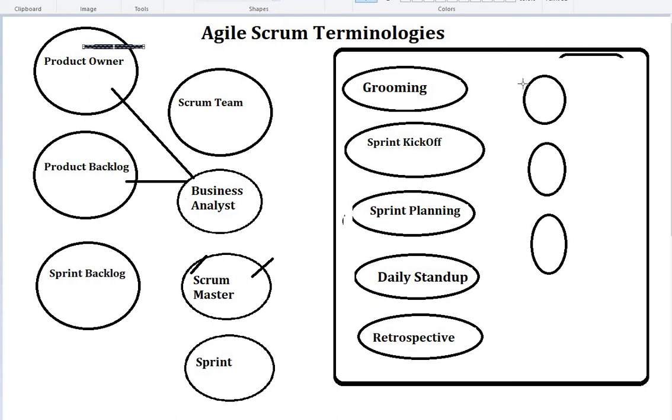Based on your project and role, the grooming may go for 2 to 3 hours in one sprint. In this grooming meeting, each team member will discuss the different acceptance criteria they have and ask lots of questions. After this meeting, each of the team members will understand what each requirement includes and what they are going to work on for each user story.